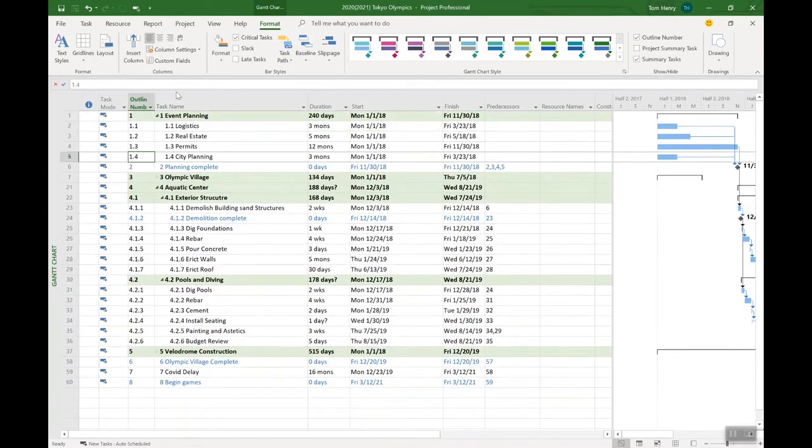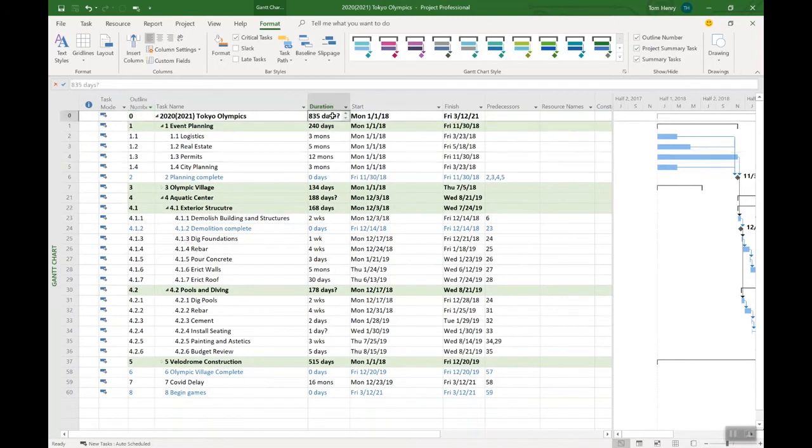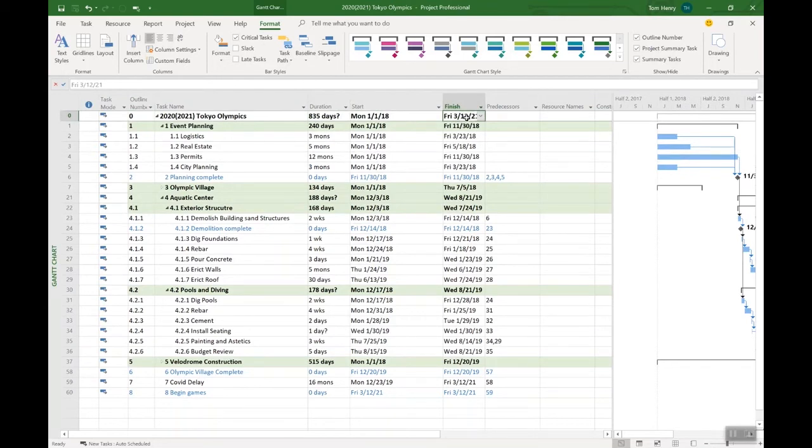Another one: project summary tasks. You see in line zero I had the name of my project displayed, which is much more than the name. It tells me the duration of my project, start date and finish date of my project. That project summary task is like a master summary, I like to think of it. It summarizes everything that's going on within the project. Pretty nice.